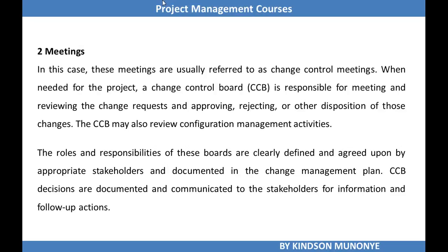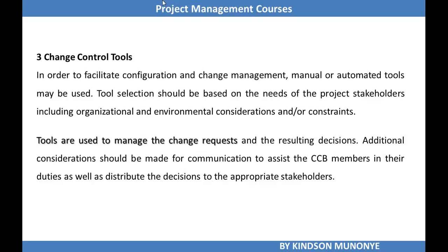Change control meetings are held in the course of this project. When needed for the project, a change control board is responsible for meeting and reviewing the change request and approving or rejecting it. So after expert judgment and meetings, we then need change control tools. These tools are used to manage change requests and resulting decisions. These tools might be manual tools, they might also be automated tools. Additional considerations should be made for communication to assist the change control board members in their duties, as well as distribute the decision to appropriate stakeholders.